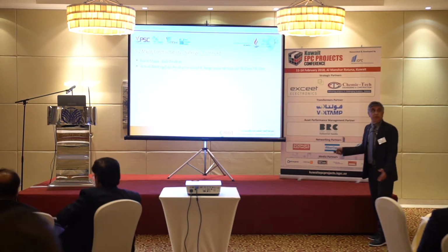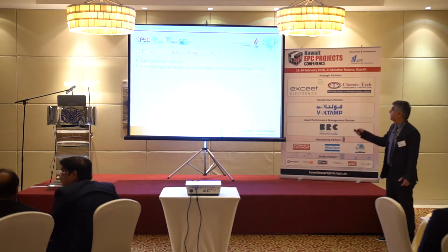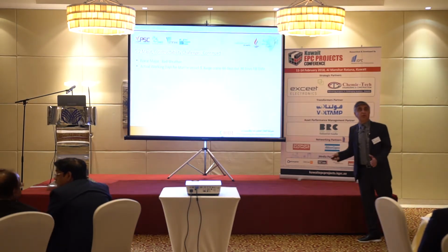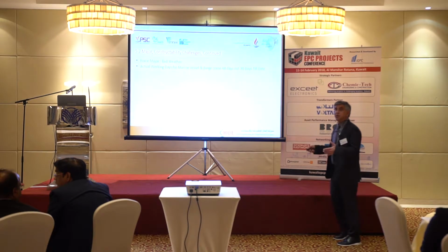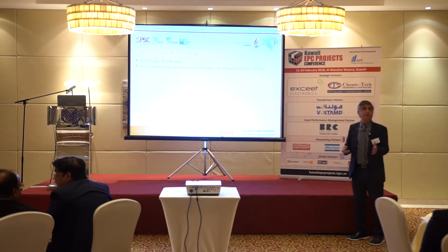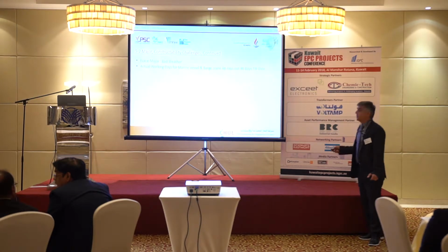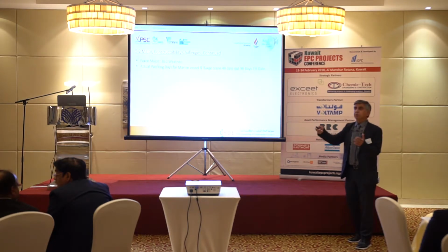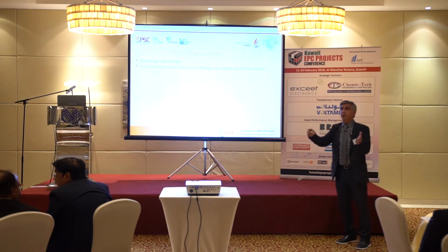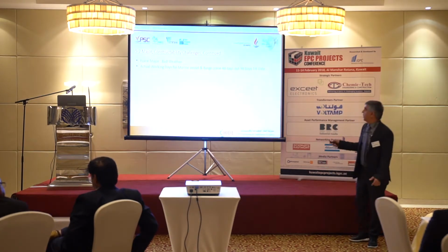Now the other major constructability challenge is the bad weather. We are working in the offshore area, using a vessel, a barge. As of today, 90 days have elapsed and we only utilized this vessel for 48 days. The rest are lost days, because of the bad weather, as well as some of the cargo which has to be loaded with the products in the berth for shipping, and you have to stop the work.